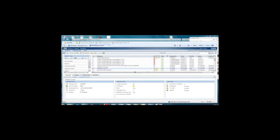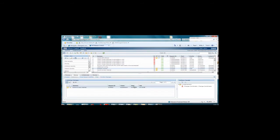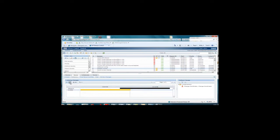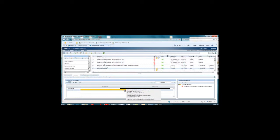HP Release Control automatically compares every change request with all others with the same timeframe while also considering blackout periods and maintenance windows, identifying potential collisions which could result in downtime.